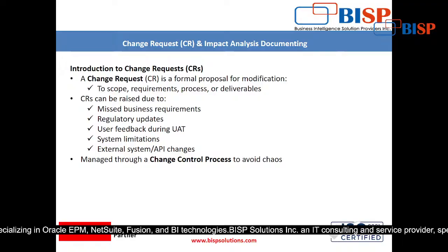So at that time our boss, who was a civil engineer, said that RERA has made some modifications in their compliance or the regulations, right? So kindly make this update. Now this thing was included in the change request. When we had freezed the BRD, there were no such changes, but when we came up to the halfway of the project, at that time they received some modifications in RERA compliances. So definitely the boss will say that okay, please accommodate.